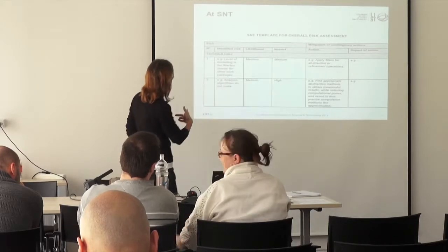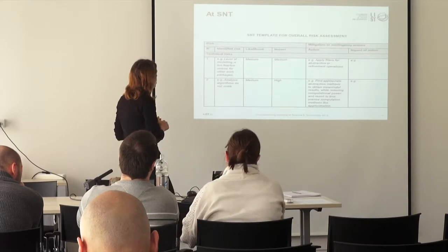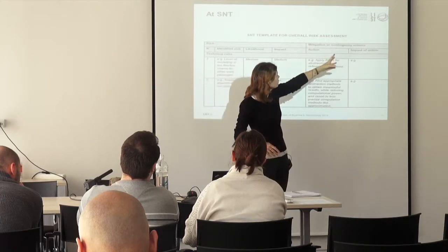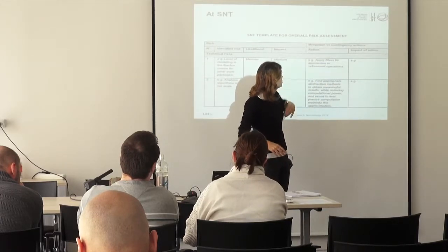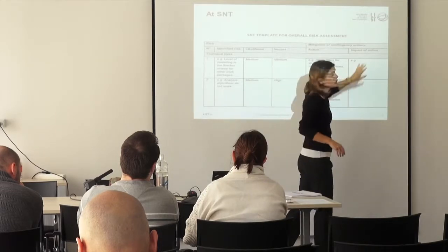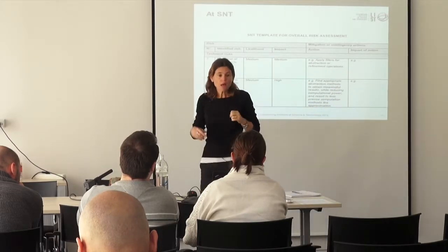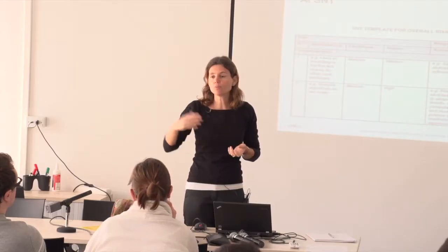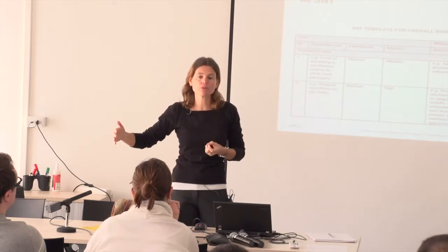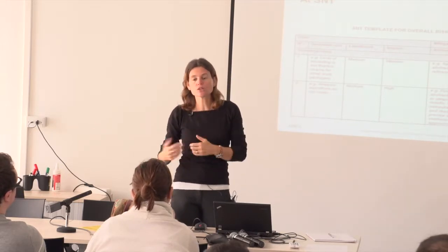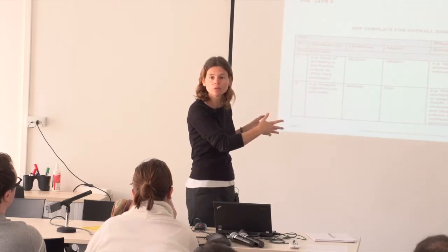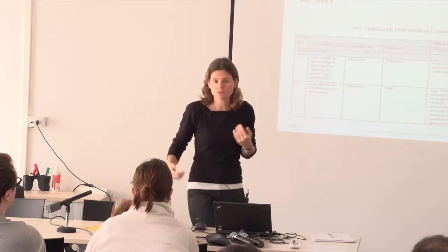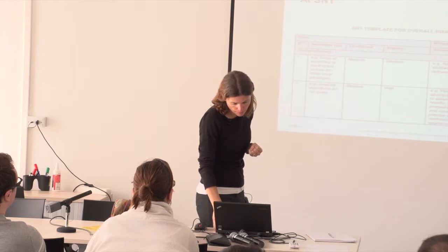In that same document we've seen earlier, you've got the second part of the table with the mitigation or contingency actions, where you just define the action and what you expect from that action. At the stage of the project proposal, it's enough, because you're not going to put some dates or people responsible for the action. Whenever you actually start the project, then you need to take that table and put more in your action plan, so it's really a plan with dates and responsibilities.